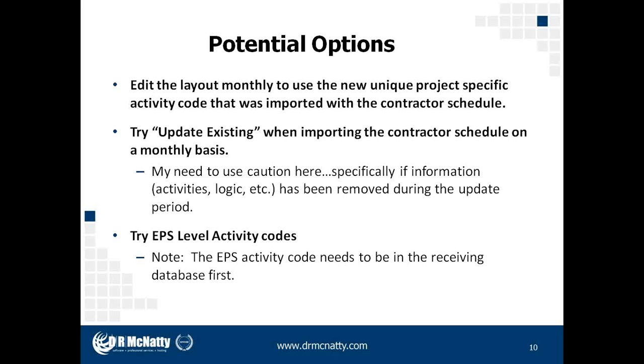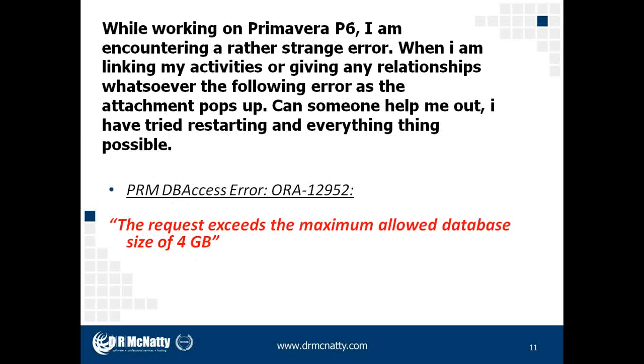The other option I tried was to look at an EPS level activity code. The main takeaway in going through this option was that the EPS activity code needs to be in the receiving database first before importing, say, a contractor's schedule. Okay?